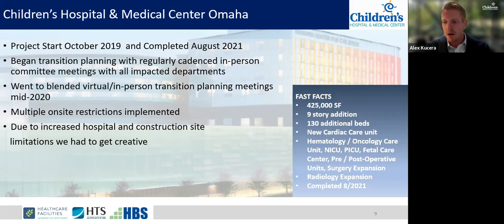Obviously, with construction ongoing, we didn't really slip as much as we thought we would with COVID. We had an initial go live of the middle of summer of 2021, and that slipped to the end of summer, mostly because we added another floor to the project. So we kept things moving with the project. Obviously, we have had a lot of hurdles and a lot of fun times, and we'll talk about that in a couple more slides.